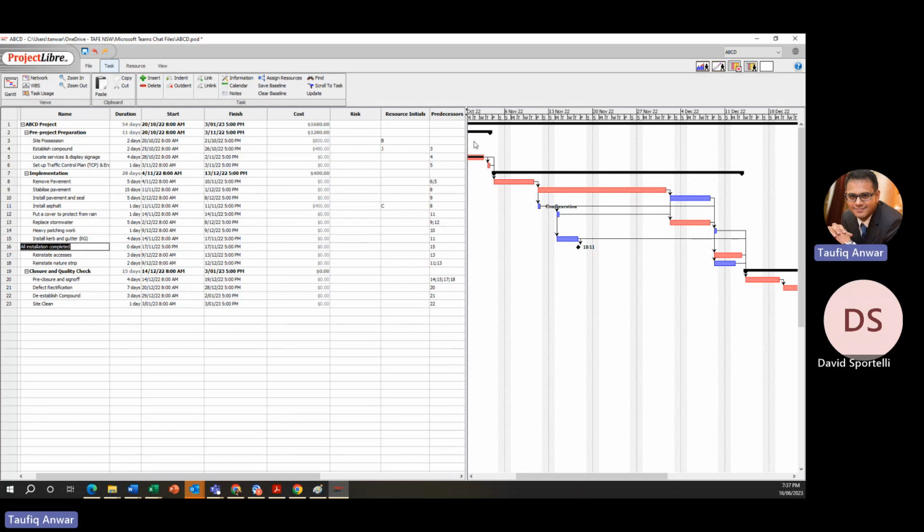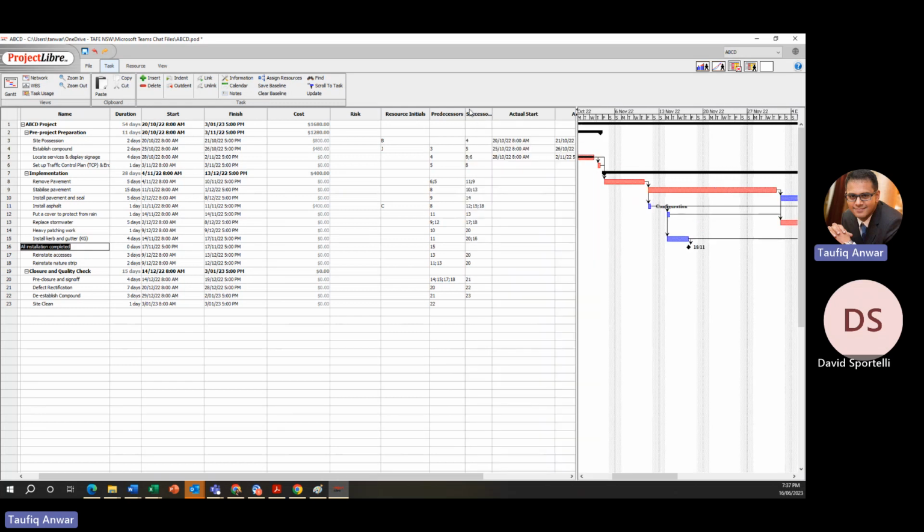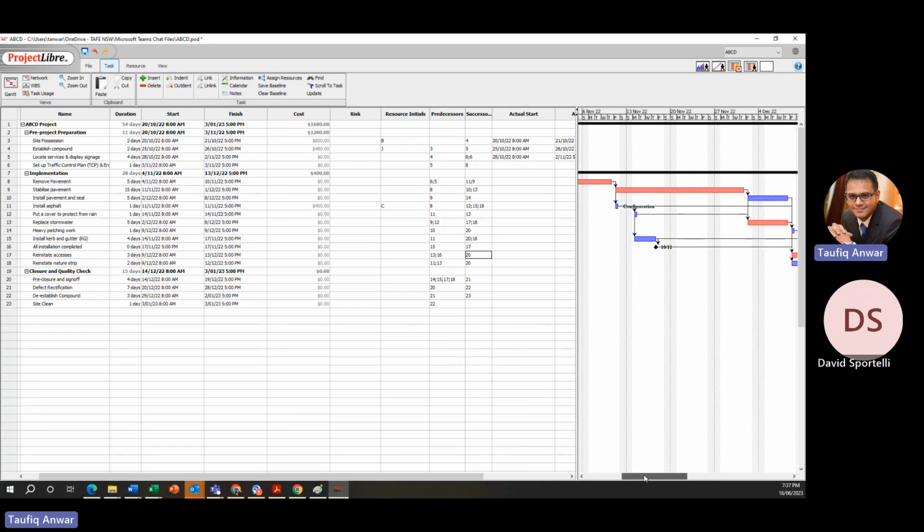So it has to have a child. We will put probably number 17 as the child after this, meaning it will follow from there. So this diamond shaped thing is always a milestone, and the milestone should always have 0 days, because it should not be a task, meaning no one has to work on it.